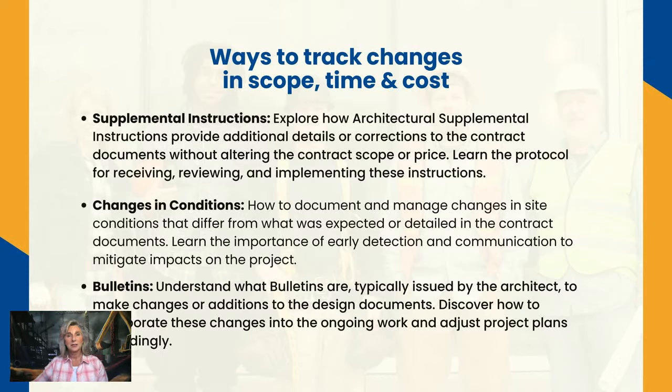And so the architect might put out this supplemental instruction, which resembles very much an addenda possibly, but it is after the contract's been awarded. And so this most likely is going to generate a proposed change order from the contractor, identifying potential time and cost associated with the supplemental information that's been provided.